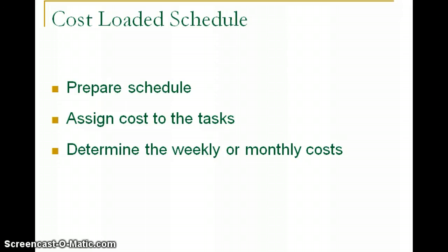Another tool that is used in terms of managing construction costs is the cost loaded schedule. That's a project management tool that correlates the cost of the job versus the time frame of the job. Okay.